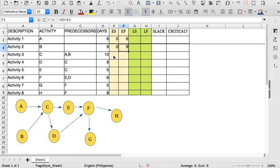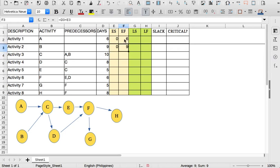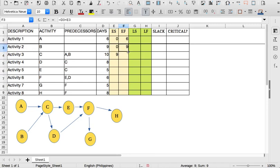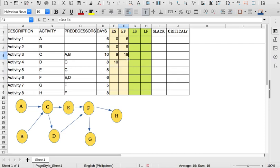Next we go to activity C. Activity C has predecessors A and B, so when can we start C? The early start of C is when we already finish both A and B, so the latest will be 9. If we choose 6, activity B is not yet finished, so the early start of C is day 9. The early finish of C will be 9 plus the days, which is 19. Now we go to D — D is only dependent on C, so the early start of D is 19 and the early finish will be around 27.